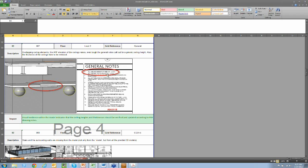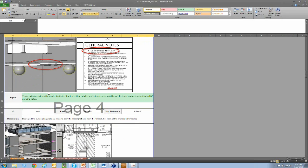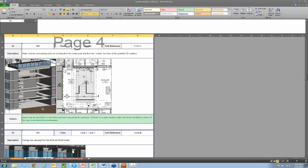And this is a small example where you can see that all the ceilings are supposed to be at a common elevation per the reflected ceiling plan. However, inside the model, because of this pretty simple overlap, we can tell that one of these ceilings is off by at least an inch or two. So this is the stuff that we would go in there and do a very detailed look at to make sure that everything we need is in there. This is another example where we have a stairwell where all of the interior walls, the shaft walls are missing.